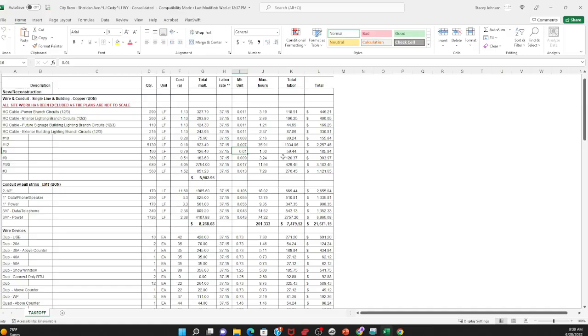You know, at the bottom of all of our estimates, it says it's based on plans and specifications and good for 30 days. So at the end of 30 days, you have to reevaluate because, like you said, with the inflation and with the price of copper and everything, you have to reevaluate your wire costs almost on a weekly basis. Literally, right now, to get any transformers or pads in is a 3 year wait time.